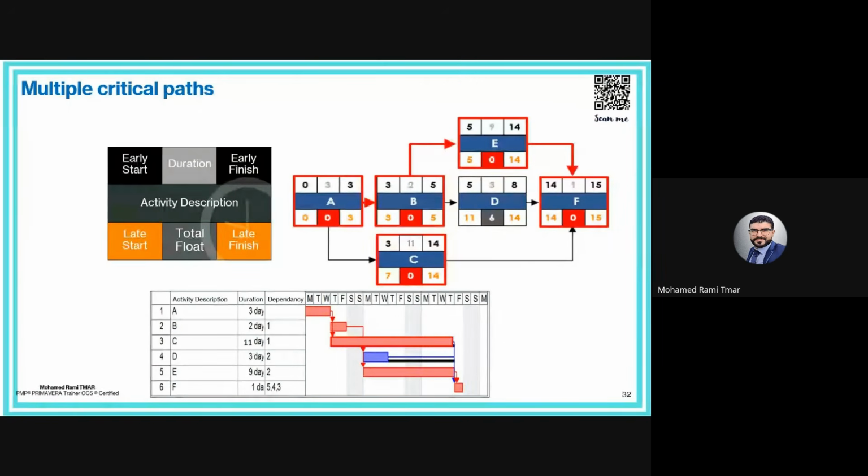More explanation to make it simple. Let's take a simple example. We have, for example, a path A of 20 days, okay? So it is the longest path. And the path B is 18 days. So near critical with only 2 days of float, okay?